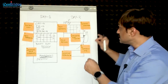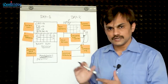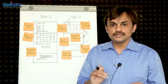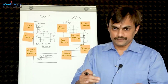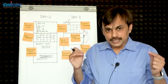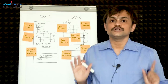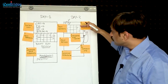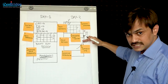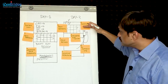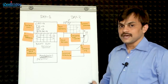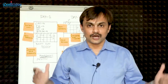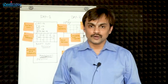The second output which comes as a result of these two days of PI planning meeting is called the program board - we will explore it in a little more detail in the subsequent video. The idea of a program board is understanding the interdependency between various teams in order to achieve the PI objective. I need to visualize how I am dependent on each other in order to achieve that, and I visualize it in the form of a dependency diagram which is called the program board. This PI objective and program board starts getting prepared on day 2 itself, and by the end each team has their PI objective, and as an Agile release train we have a joint PI objective as well as a joint program board showing an integrated view for our upcoming PI.